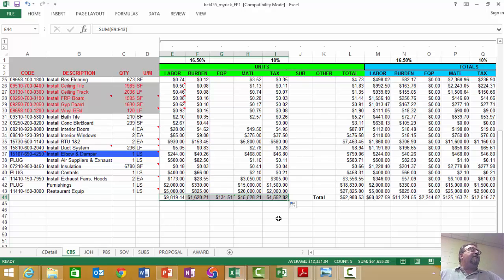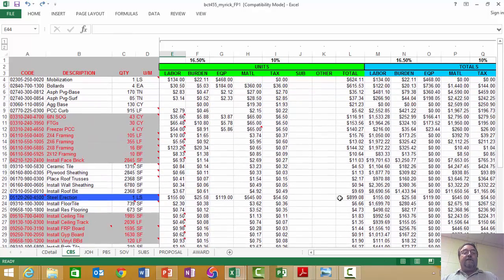I think you're thinking what I'm thinking. You can't add those up. They're all different units of measure. You can't add up costs with different units of measure. It means nothing. When it's units, unit costs, or unit prices, you can't total them. So that's one of the big mistakes that people would make, and I would count off for in the estimating class.